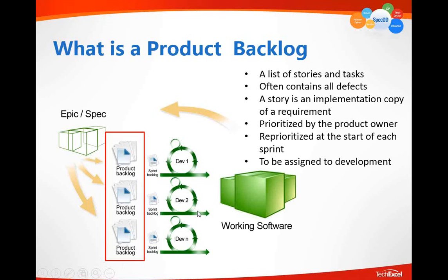And in terms of a big project, often team 1, team 2 are developing a specific component of the big product. And one team, like team N, might be responsible for making sure all the components can be integrated, so that the working software containing all the components from the multiple teams will be working properly.